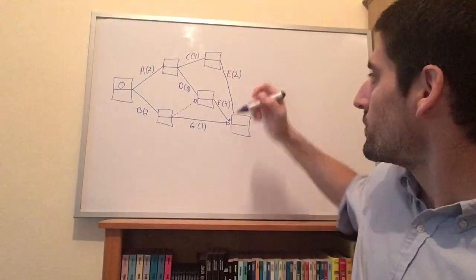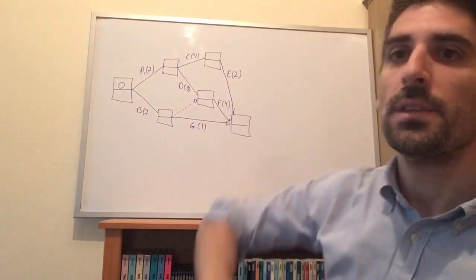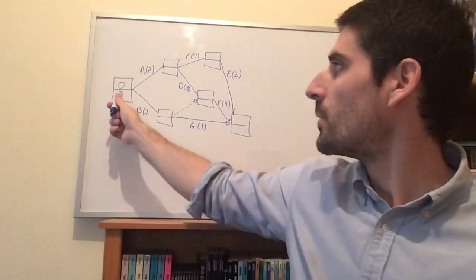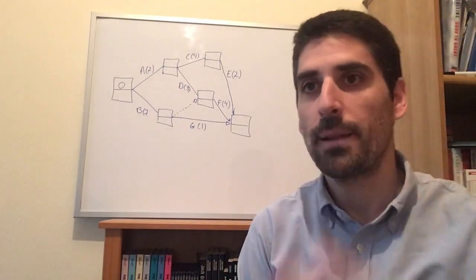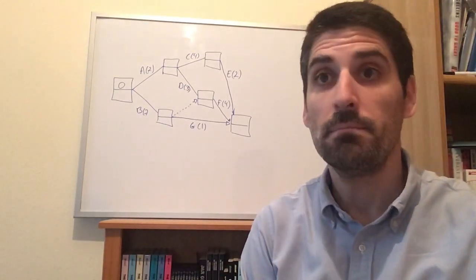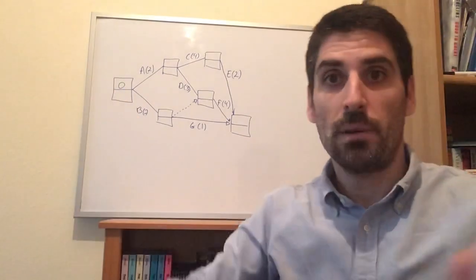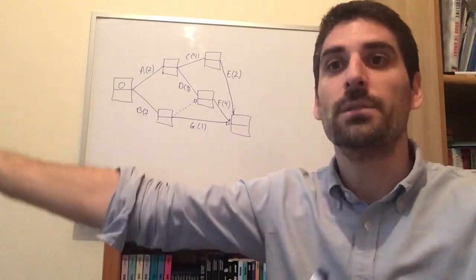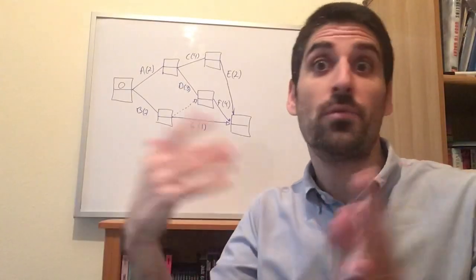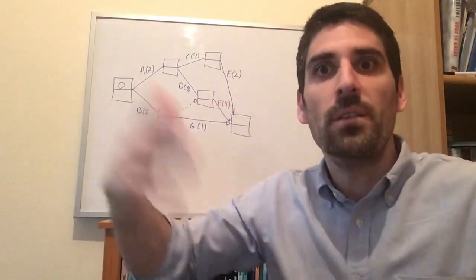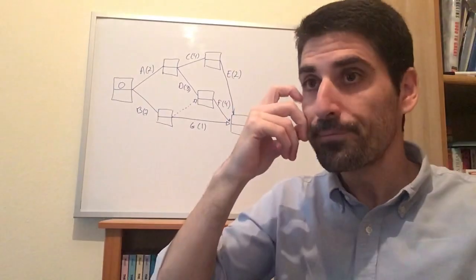and remember, they all have to converge on the sink node there, and we start at the beginning. The earliest that I'm going to start the first activity is 0, because as soon as we start, we start counting from 0. So your early start time for your first activity is always going to be 0. That's when we start counting.